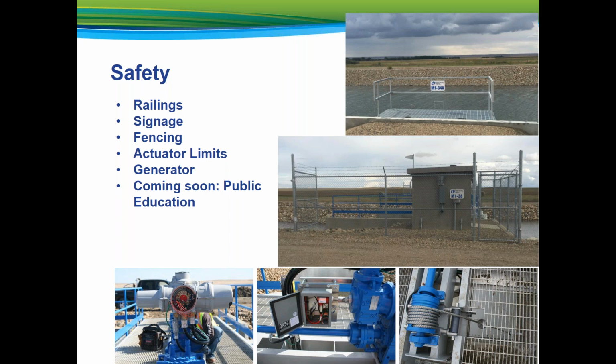Measures have also been implemented to protect the M1 canal itself and the associated structures. These measures include the overflow structure previously discussed, actuator limits, and generator connections at each check structure. The following measures are used to protect the overshot gates and include the hardwired upper and lower limits that come from the factory in the Rotork actuators. In addition, there are encoders on the drive shaft that have programmed upper and lower limits that we program into them at the time of commissioning. And then there are slack limit switches and overtravel switches located on the cables themselves.